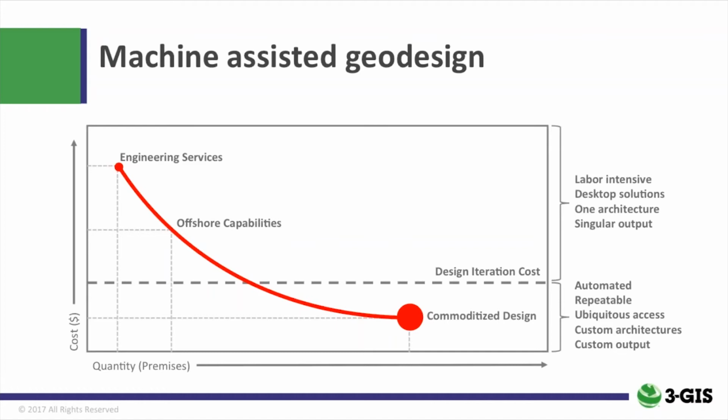We've seen numbers as high as 600% increase in time to permitting, which we know can be a long lead time and something that's completely out of your control. So getting to permitting as quickly as possible is critical in the success of your fiber build. But potentially more important here, and you'll notice here on the dotted line, is the iterations.